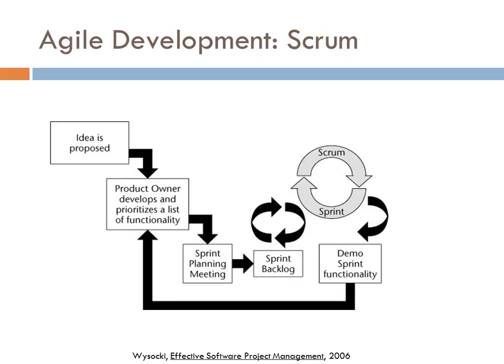We typically, at the beginning of every day, have a stand-up in which you discuss three things: what you accomplished yesterday, what you're going to accomplish that day, and any barriers that are in the way. And then the leader, the Scrum Master, tries to support all the developers by removing the barriers and seeing any other way that they can support all of their developers. Typically in 2-week iterations or sprints. So one smaller project should be completed within 2 weeks.